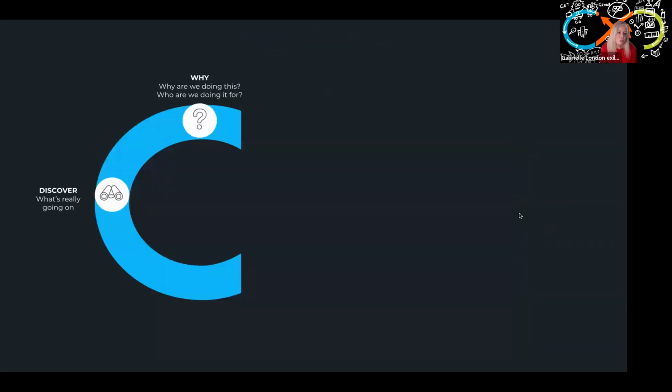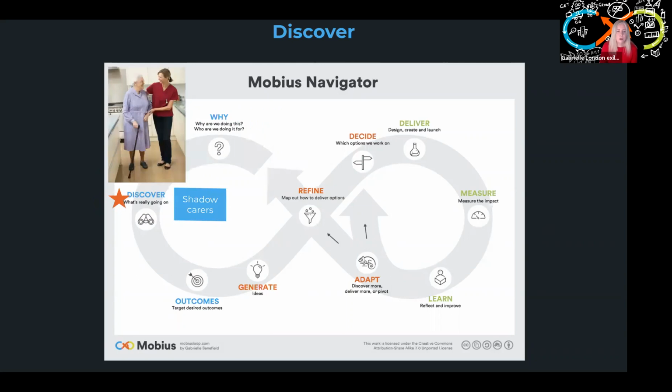And so when we discovered what was really going on, we went out. Instead of the old contract model, about two thirds of it was really mandatory things you need out of the box as a platform, but one third was not set down at all. Instead, we wanted to generate the outcomes as we went and test against them. So that became the whole outcome-driven way of delivering this.